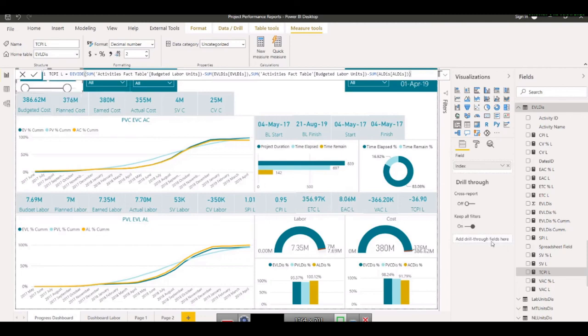So in that case we need to change the formula to one which is more suited now. Here the estimated completion labor, which is this, minus this. So this way we will get rid of this negative value, and the TCPI will also tell us that we need to work more productively, a value of more than one should come, so that it will tell us that we need to increase our rate of working. Actually it is saying 0.95. So now we need to understand what that means.